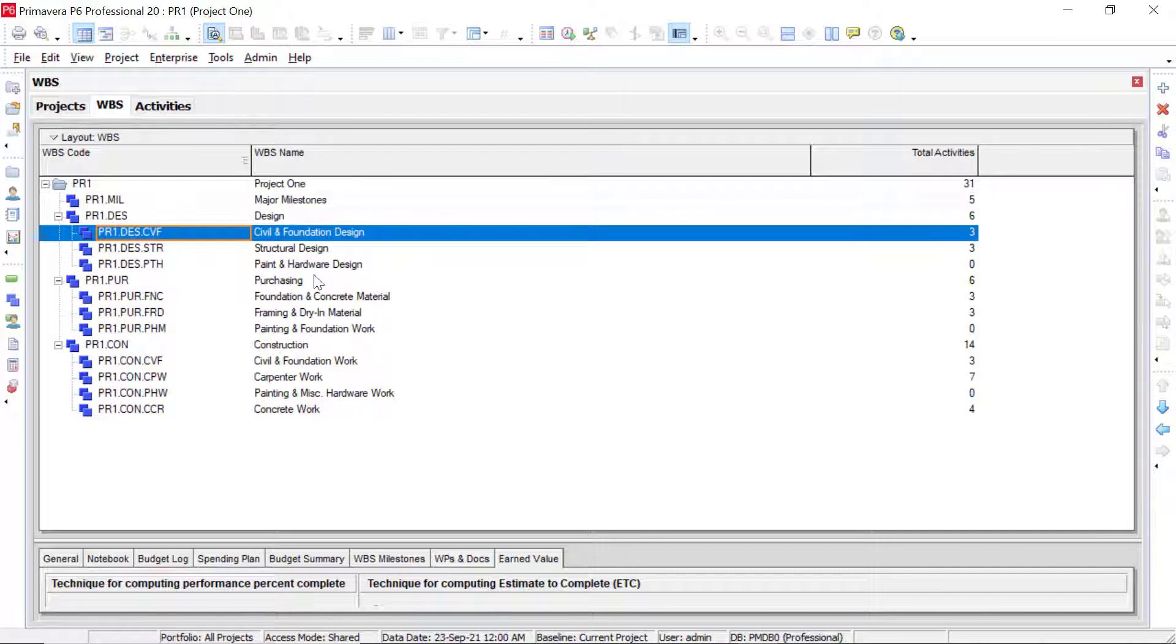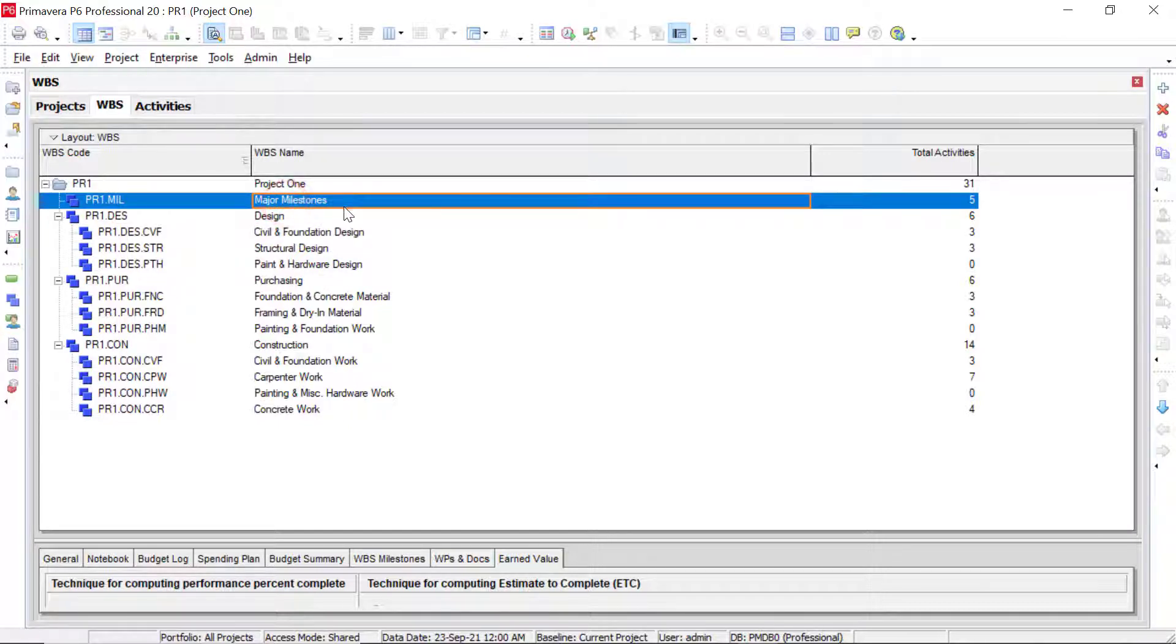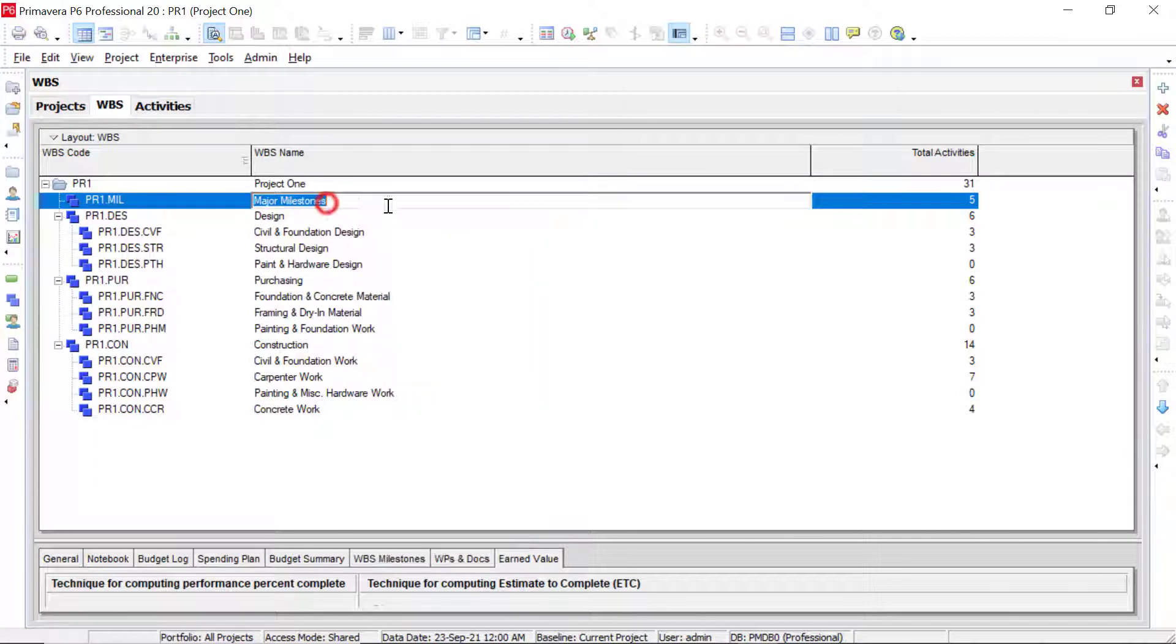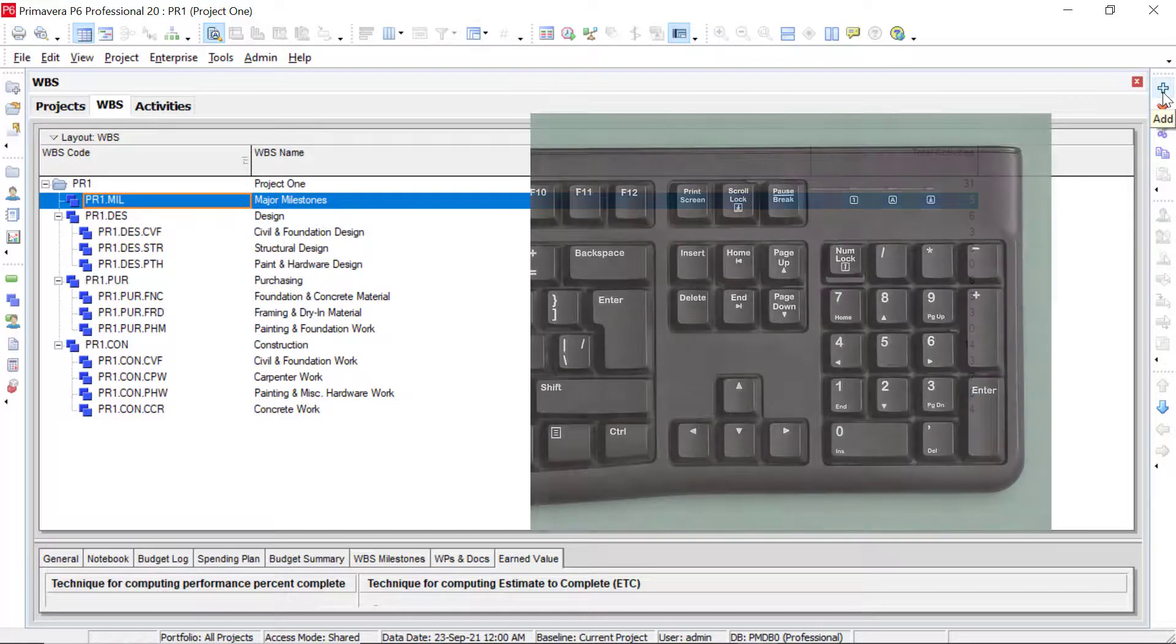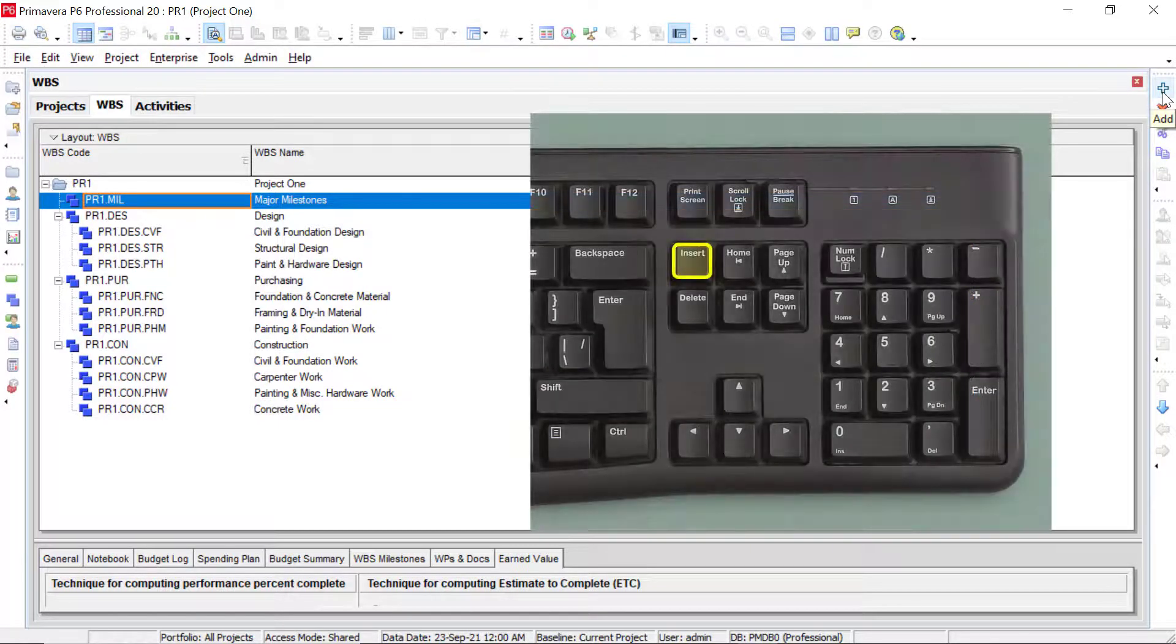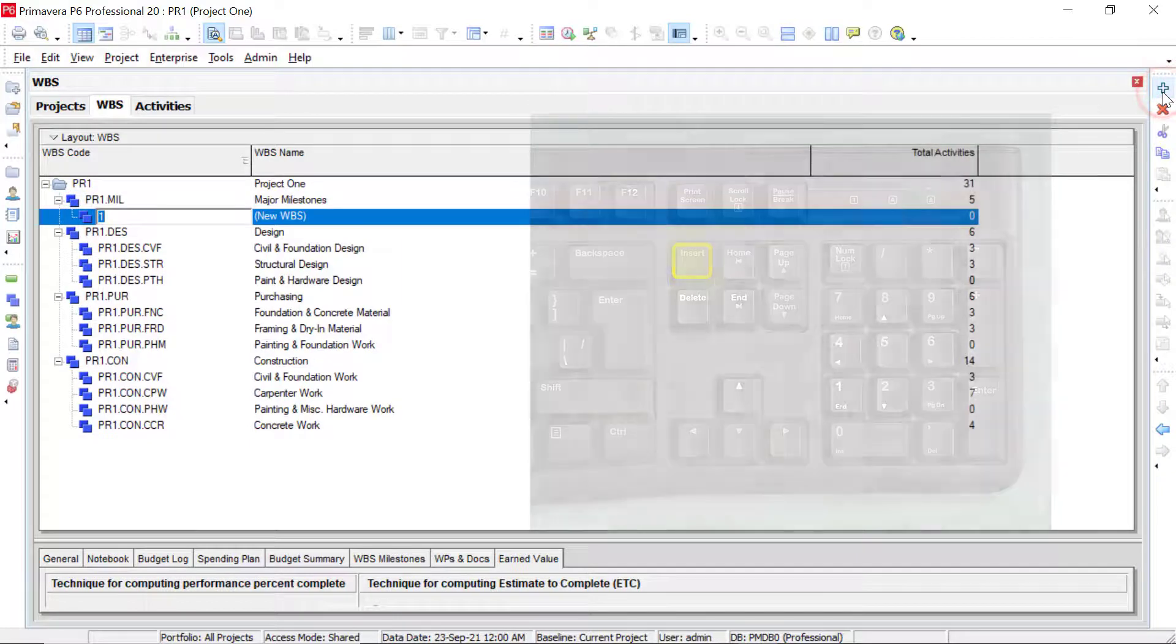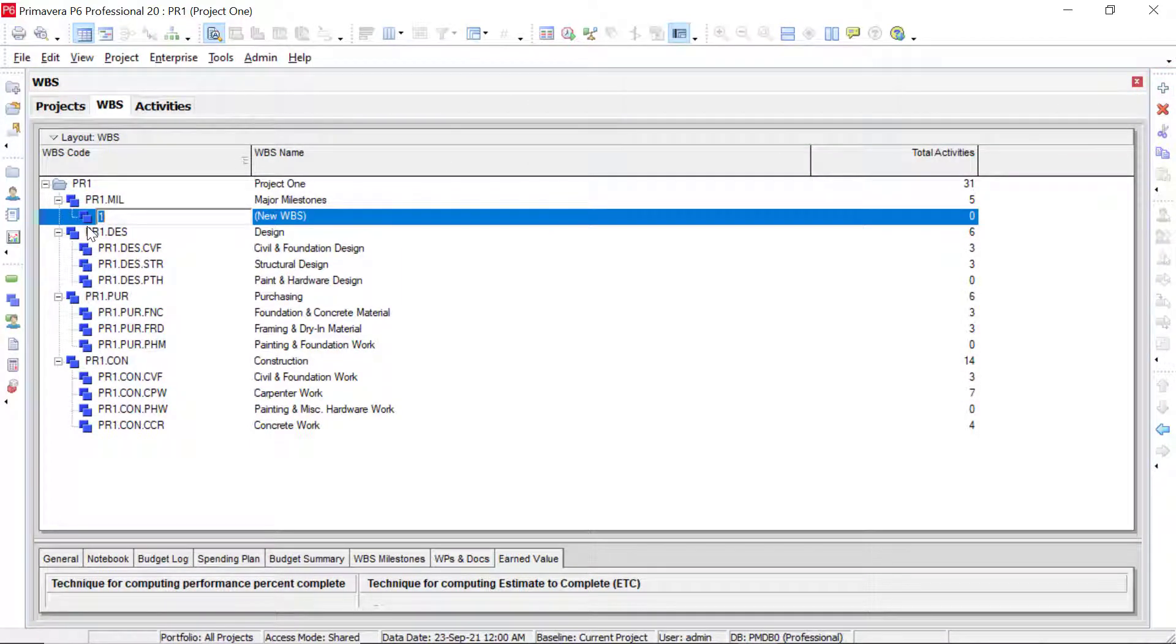So what we'll see is as we're adding in these WBS elements, whatever we are selected on when we add an element, it's going to go to a level underneath that and create a parent to child relationship. So for example, if we click on major milestones, we can right click, select add, we can also click on the plus sign up here, or you can select insert on your keyboard. So if we click add up here, we see that we have an element that was added in.